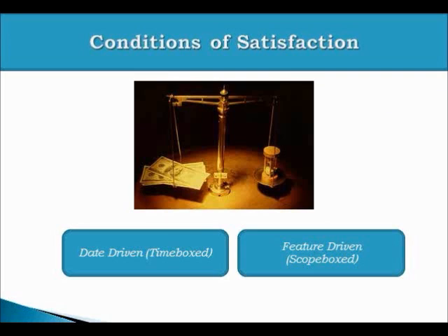Now condition of satisfaction is not like, if you have 10 stories, that I want all these 10 stories developed in 6 months. Rather, conditions of satisfaction are more focused towards business goals. Like in 3 months time, I want to launch a website which can give me a customer for online simulation test. So that is a condition of satisfaction. Now the condition of satisfaction could be in the form of, by introducing this particular feature in my product, I want to reduce the operational cost by X%.